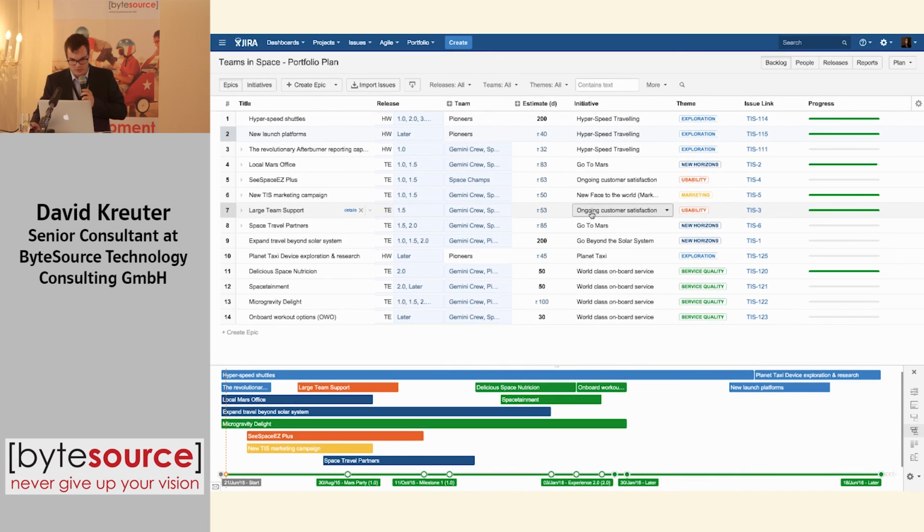What I want to mention here is you can also import the estimation from projects, which are estimated by your developers. Import these figures here, the estimation points or story points, and see the impact on your release dates. And you can also modify those estimations. If you think some feature will take longer, you can change it directly here and synchronize it back to your project, like apply updates to projects.